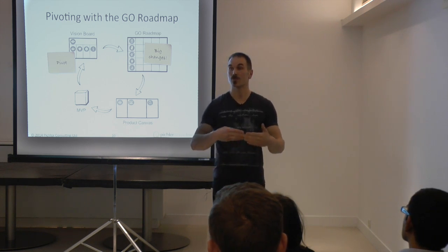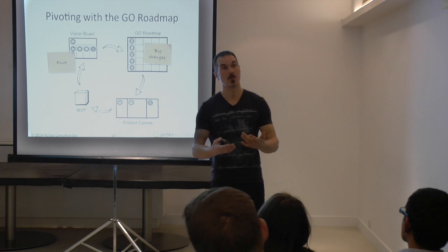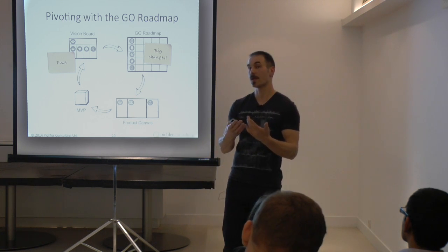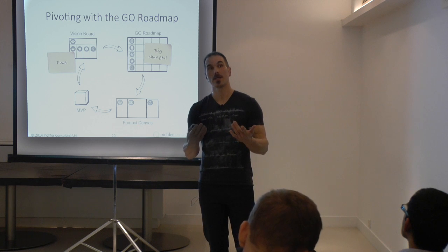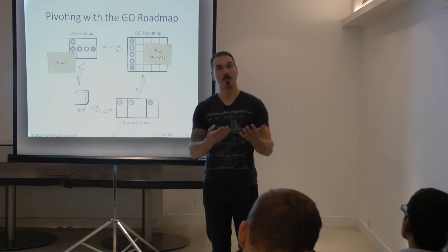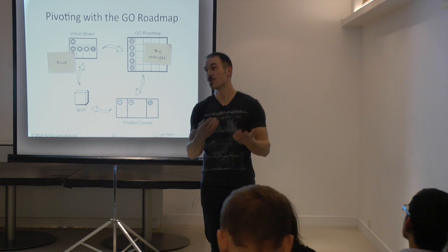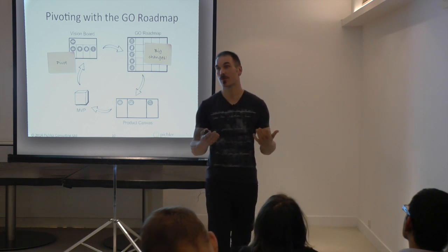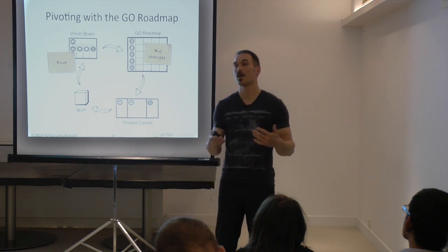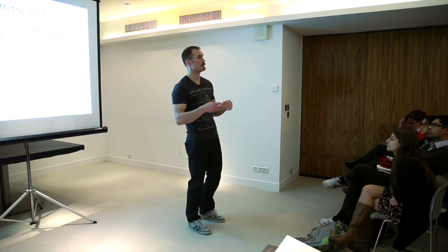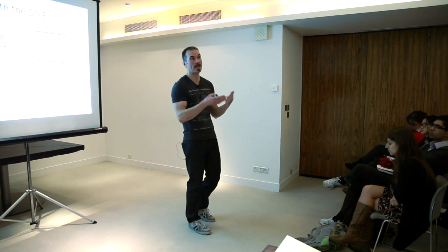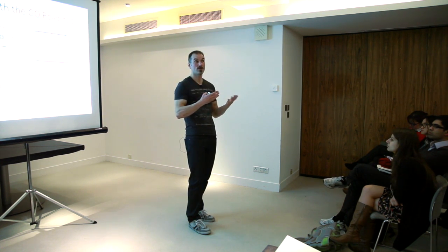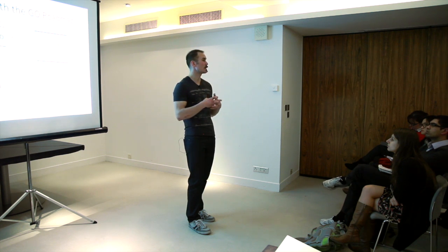And particularly once you've got an existing product out there and you're now more in the mode of updating your product on a regular basis without maybe bigger changes to it, probably having bi-monthly or quarterly review meetings is sufficient. And you can do that as part of your portfolio management process, and you get together with the other product managers and product owners that work on related products within the same portfolio, and you review your roadmaps and you make the necessary adjustments.